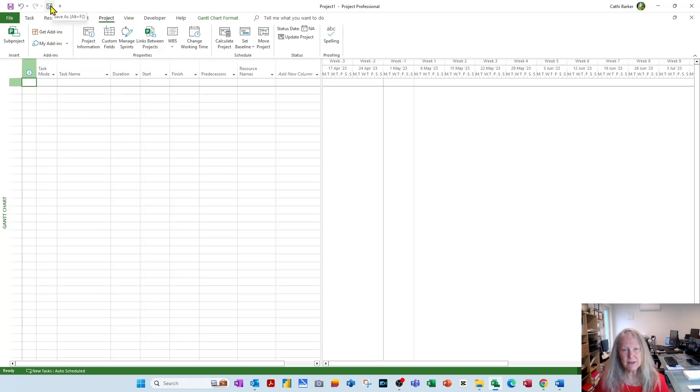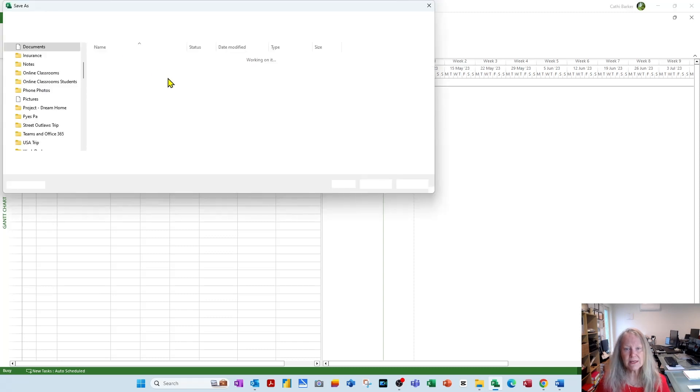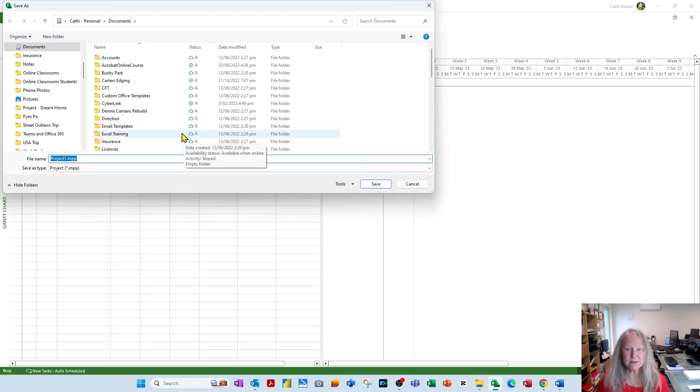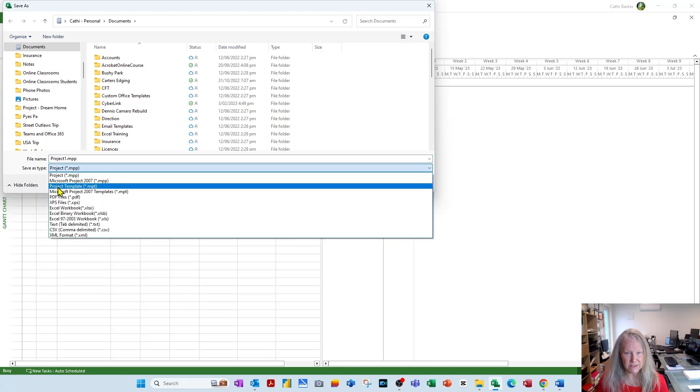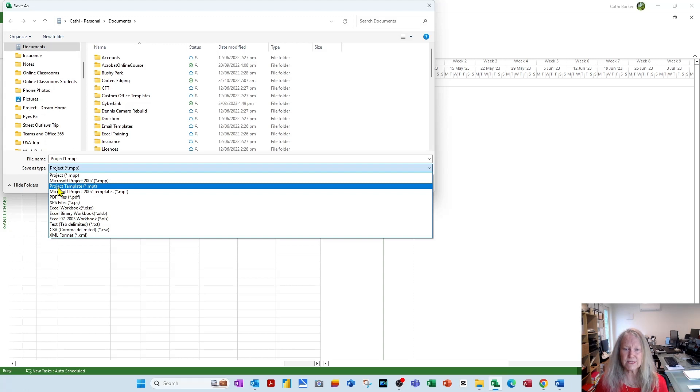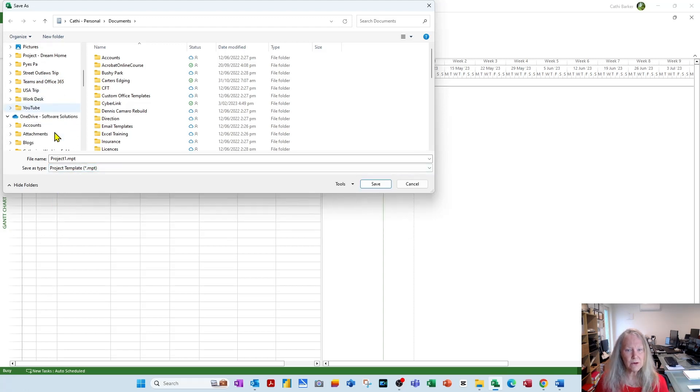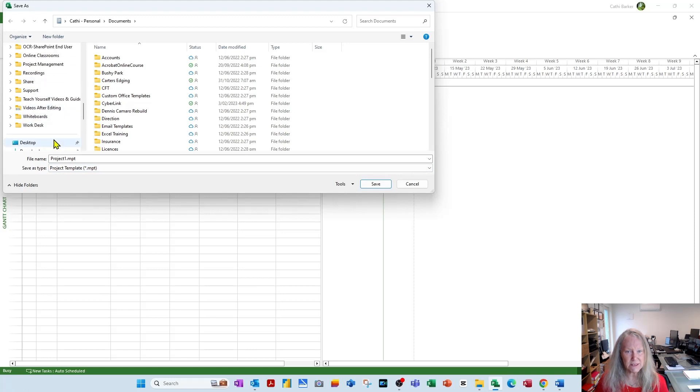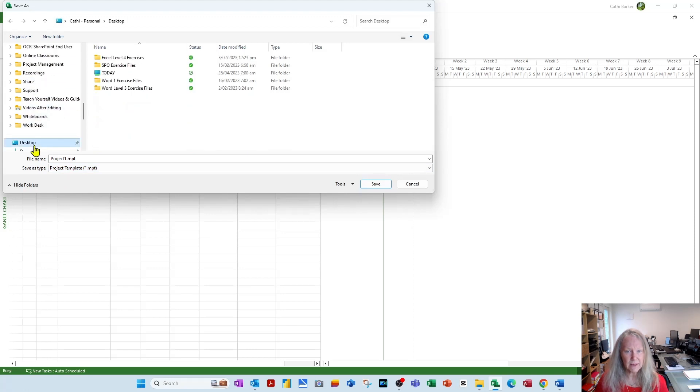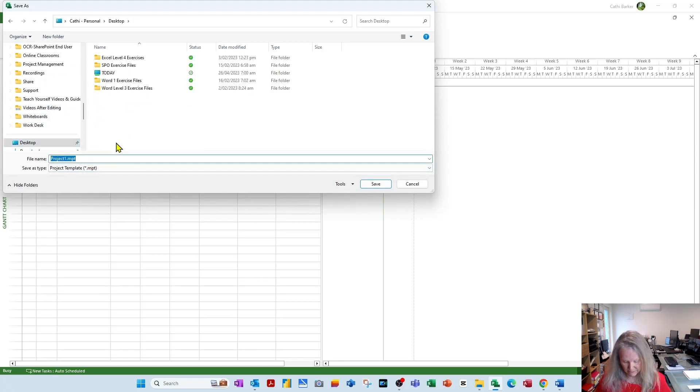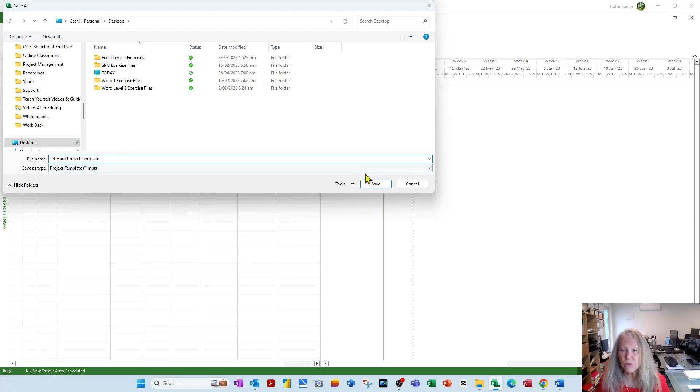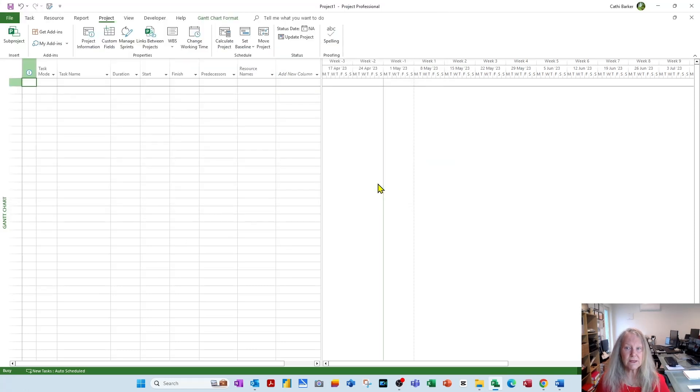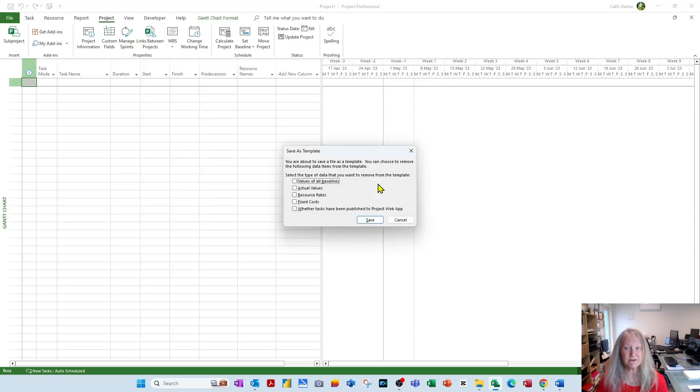Click the button or press F12, and can you please save this as not a project, which is the type here, but instead as a project template, which is the third option listed. Be careful not to choose the second option. Choose project template, and I'm going to put it on the desktop so I can find it easily, and I'm going to call it my 24-hour project template. And when I go save, it literally saves it as a project template.